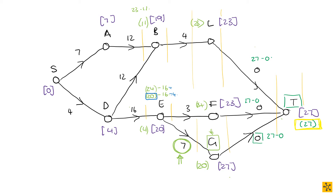Next up, we have D and A. D is going to be the slightly more complicated one because it has two arcs radiating out from it. We're going to look at the latest start times of both arcs radiating out of D. So we have 11 and we have 4. We select the smallest, which is 4, and then we subtract the weight of the edge radiating in towards D, which is 4, giving us zero. So the latest start time for D is zero. Then we look at A: 11 minus 7 gives you 4. So A's latest start time is 4.